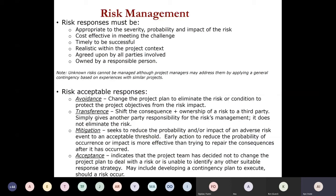And I told everybody that, you know what, you can't afford to use documents on your local machine anymore. You need to always transfer all the documents you work on, or work directly from the SharePoint. So with that, what I've done to that particular risk is I have mitigated the risk of us losing documents. So I can close that risk, saying, you know what, I'm closing this risk because we have mitigated it by making sure that we have a SharePoint. So you can see that I was the owner of that risk.